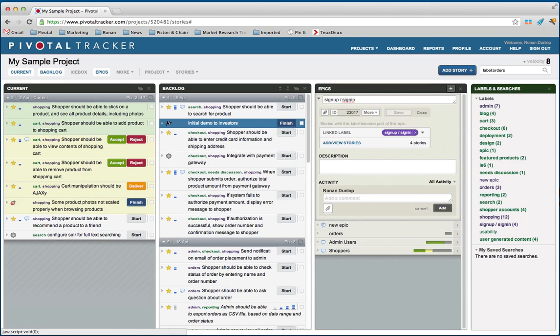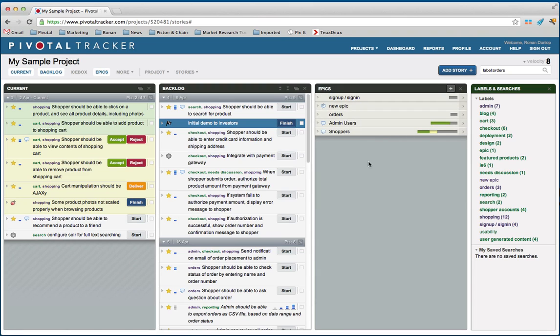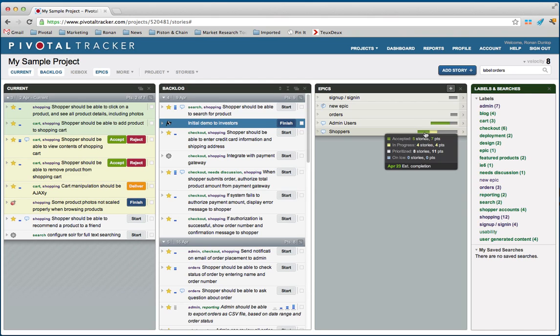You'll also see when you are looking at Epics we've got this great progress bar. In this case, the shopper's Epic which has conversation also has a portion of its work already done. If you can see this on your computer screen in this video, you'll note that this has seven accepted points and five stories, four points in progress, and eight stories are prioritized but work hasn't started yet. This also gives us an estimated completion date based on your iterations of April 23rd.